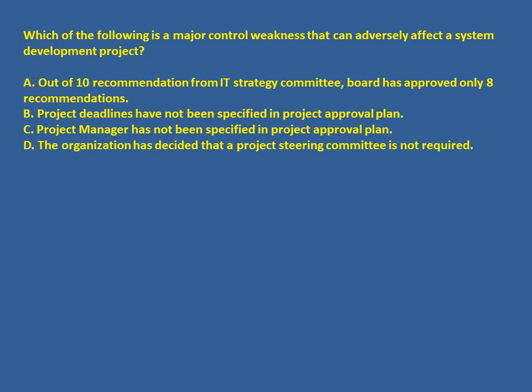The last question: which of the following is a major control weakness that can adversely affect a system development project? Option A — the board approved only 8 out of 10 IT strategy committee recommendations — is not a control weakness, since it is up to the board to accept or reject recommendations. Options B and C about project deadlines and project manager involvement are critical but not as critical as option D, wherein the organization has decided that a project steering committee is not required. Since the steering committee's role is to monitor and implement projects, without it the project would struggle to progress. Option D is the answer.